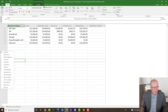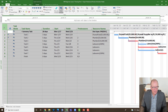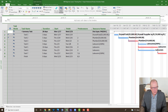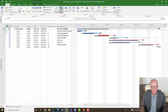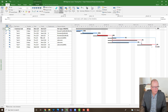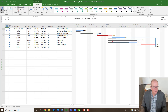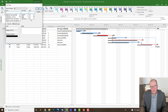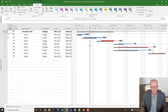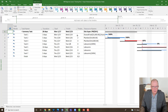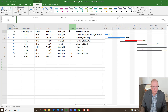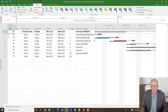In the resource sheet there are different views like the entry view and the cost view — those are the two you really have to worry about to see where your variance is. I'll slide back to the Gantt chart. I saw the variance was two days and I'd like to see the tracking Gantt. I'll go to the tracking Gantt and maybe make the text a little bigger — go to Format, Text Styles — so you can see it better. You can also pull the vertical bar and squeeze columns like you would in Excel.